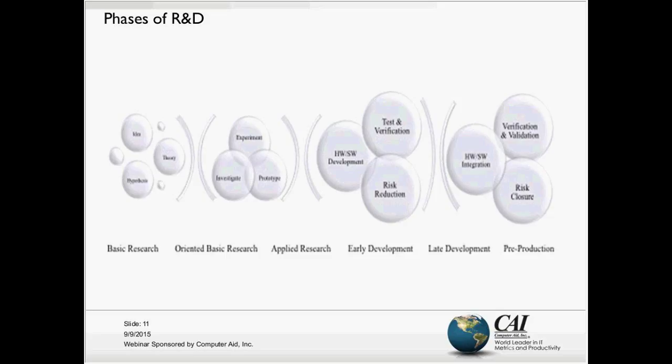Development is the activity of taking the idea and evolving it until it is a workable solution or product. Development can include processes as well as products, and its activities are things such as integration, risk reduction, test, verification, and validation. The purpose of breaking development down further into early, late, and pre-production is to show the progression experienced through systematic risk reduction as the development moves to a more stable and repeatable product or process that will ultimately transition into production or operations environments.